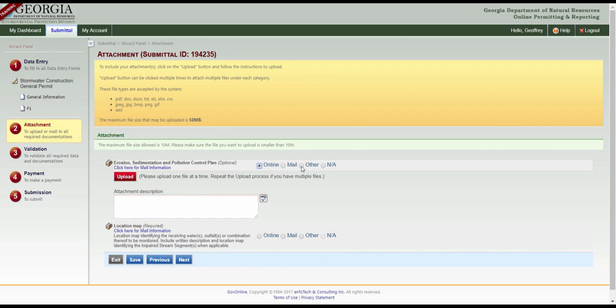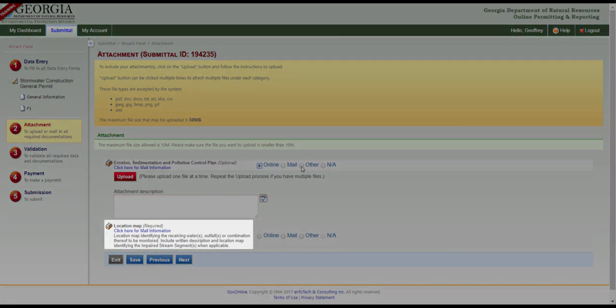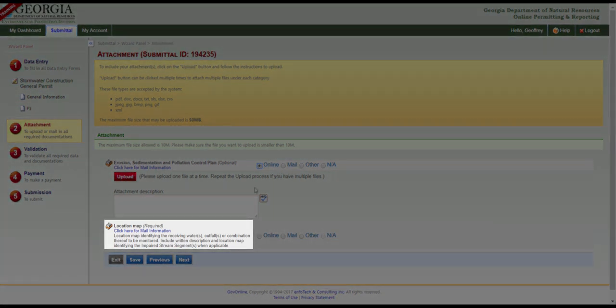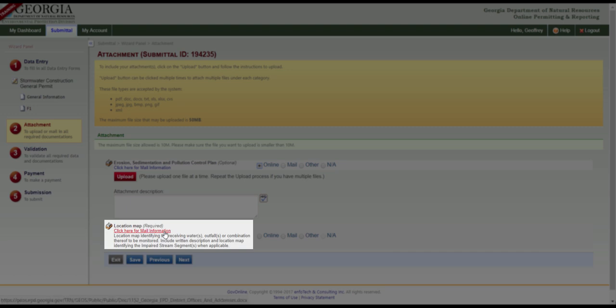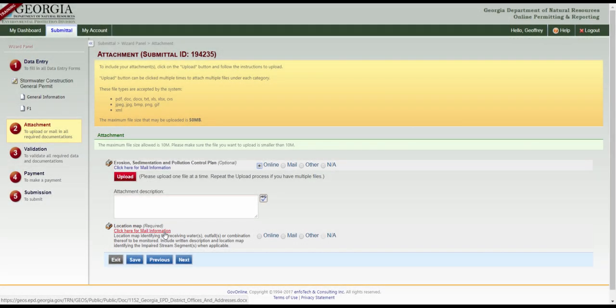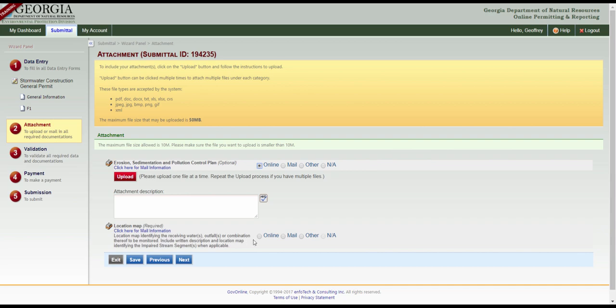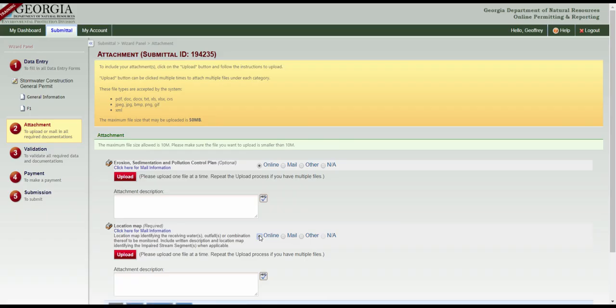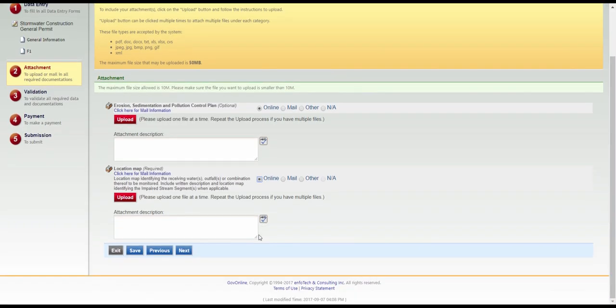To mail the location map, click here to get the mailing address of the appropriate EPD office. To submit a digital location map, select Online and then upload the file. To hand-deliver a map, select Other. Click Save and then Next.